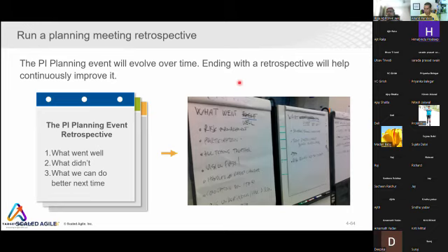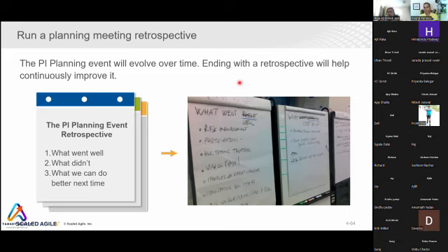Okay, got it. Then what is a feature? A feature is something which fulfills a stakeholder need. For example, you're creating a product or solution, so some part of the feature or the end feature goes into the product, which fulfills a stakeholder need. Can we decompose the features into stories in the PI planning? Epics are decomposed into features, and features are decomposed into stories. And stories are the smallest unit.